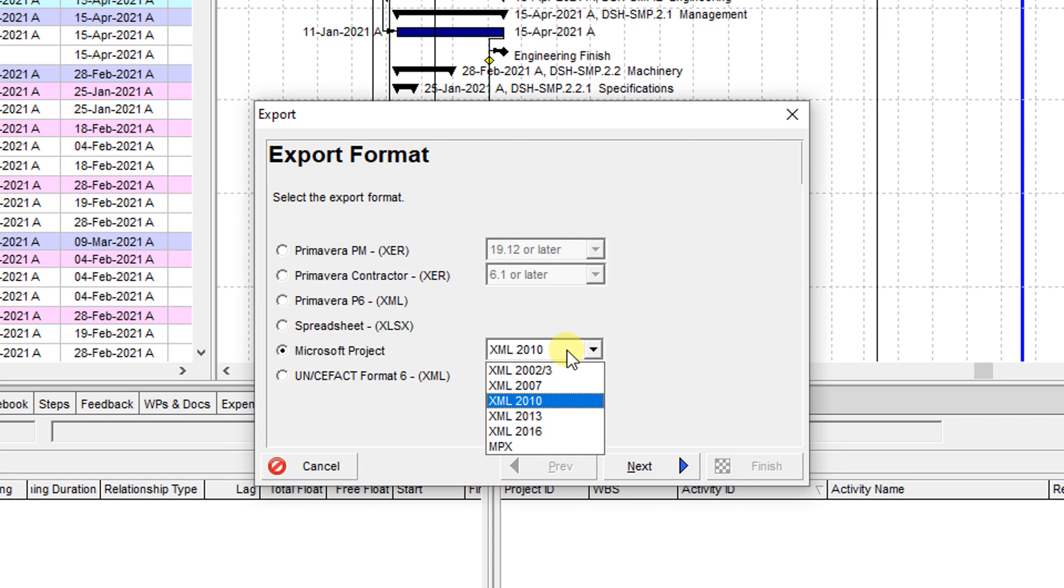Also you have MPEX, I do not recommend them. XML is more adaptable with Primavera P6. You have the XML file format in Primavera P6 as you see on the screen, but it is the same file format between Microsoft Project and Primavera P6.